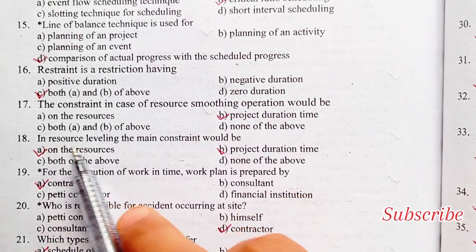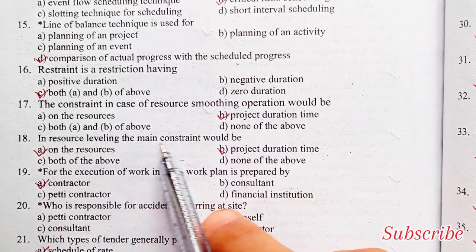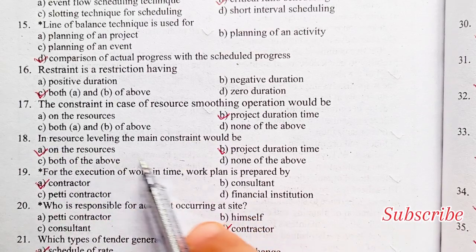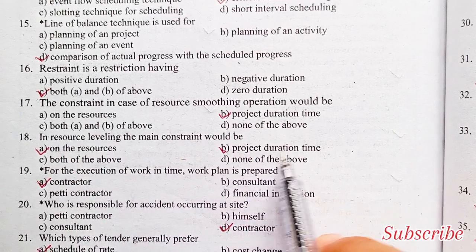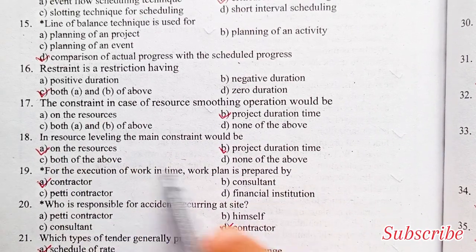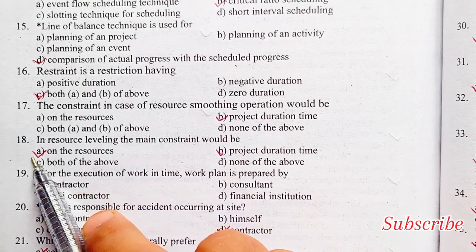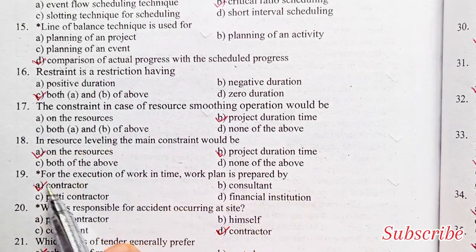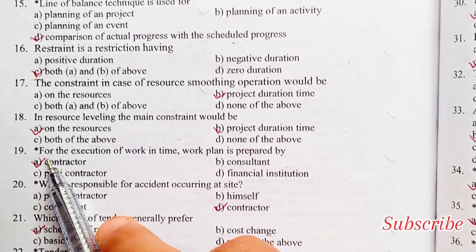In resource leveling, the main constraint will be on: the resource, project duration time, both of the above, or none. Option A is the right answer — on the resource.